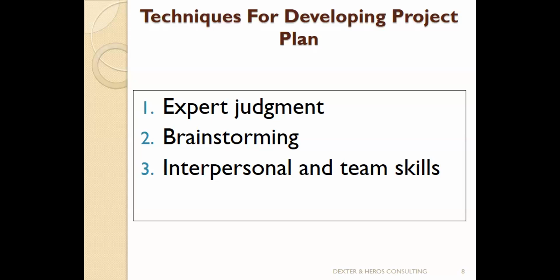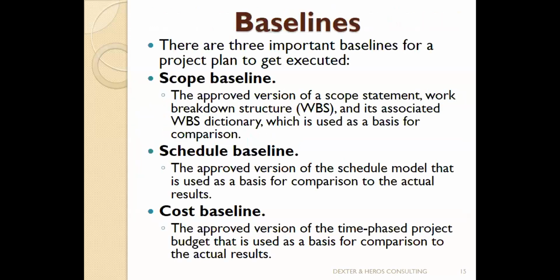So the project management plan is what you will get at the end of the day in planning. Never implement your project plan until the sponsor approves it. I don't know whether you got that line. Please get it. It's a very important line. Do not start executing the plan of the project until the sponsor has seen it and baselined it. The word baseline means approve.